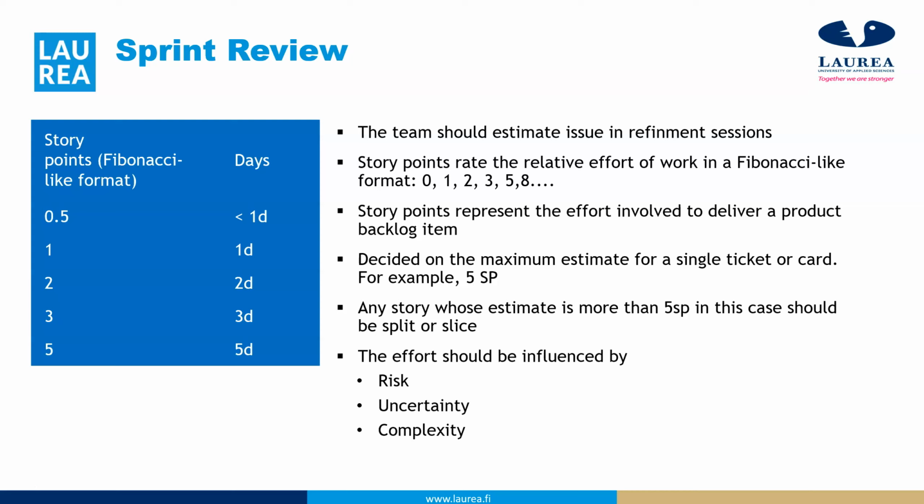That will not work. I have to get down from my house to the car, drive, go there and park. But then on the way, there might be traffic, there might be an accident that I have to wait for, there could be police checkpoints, and when I get there, I have to look for parking and then get down. So I'll put all these into consideration before I give the estimate.